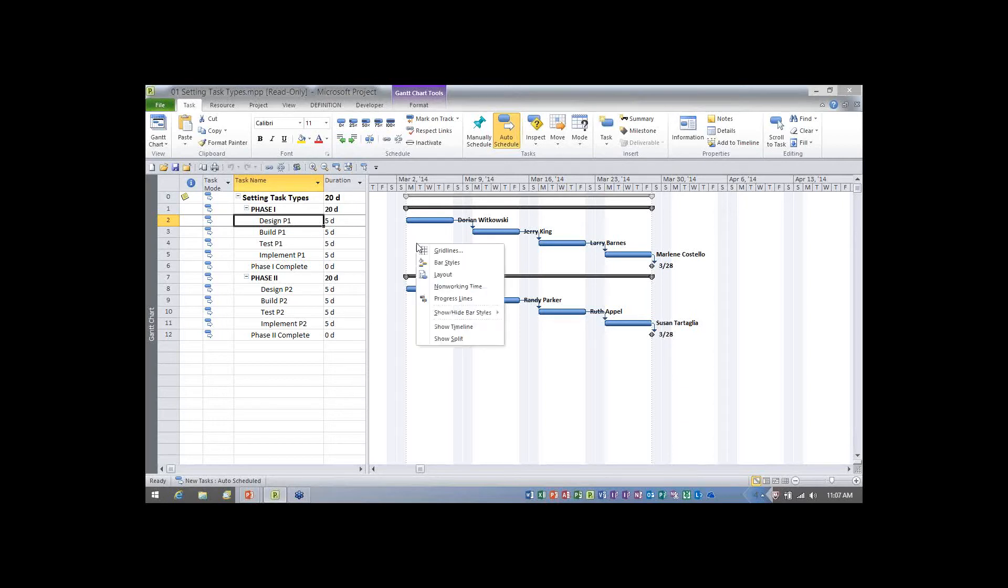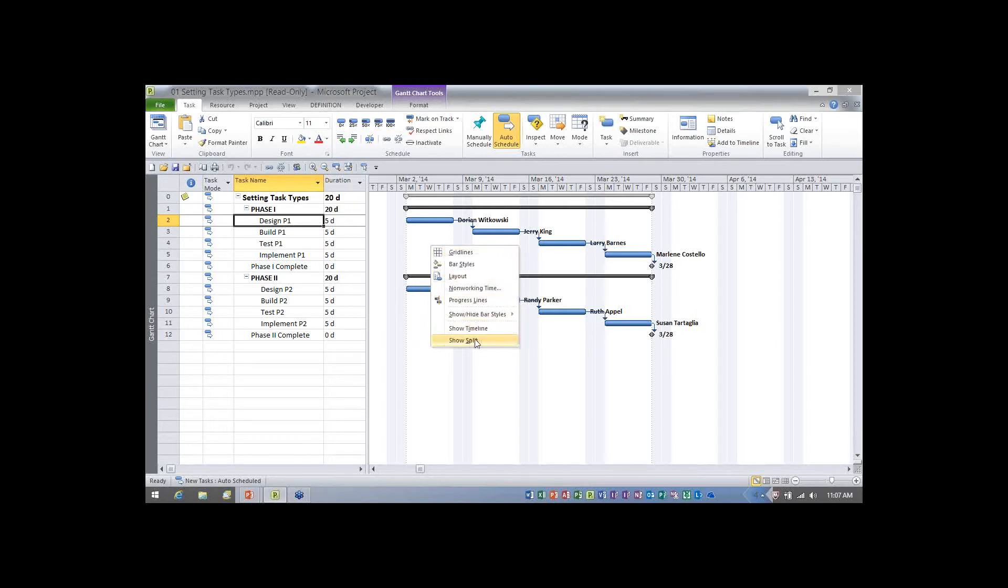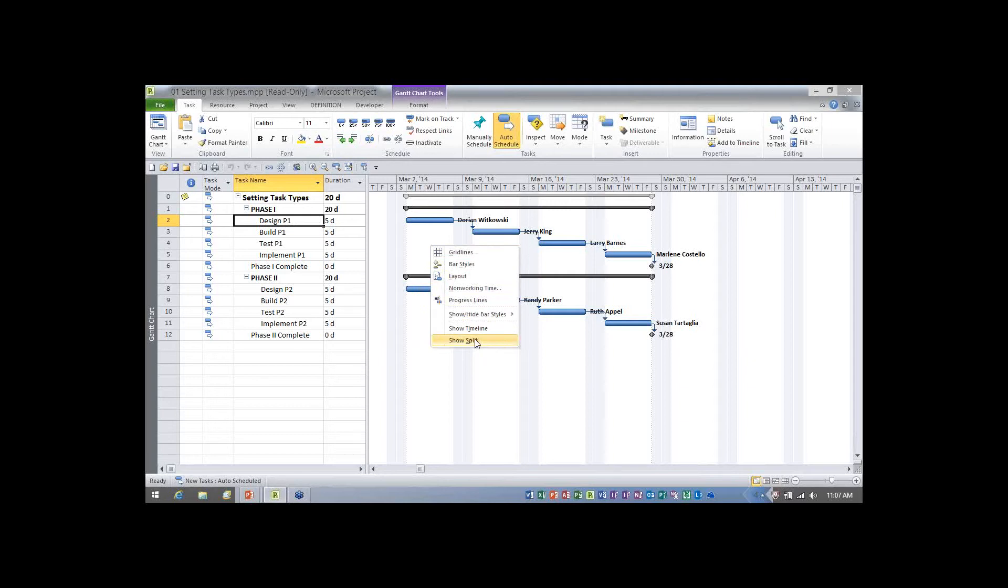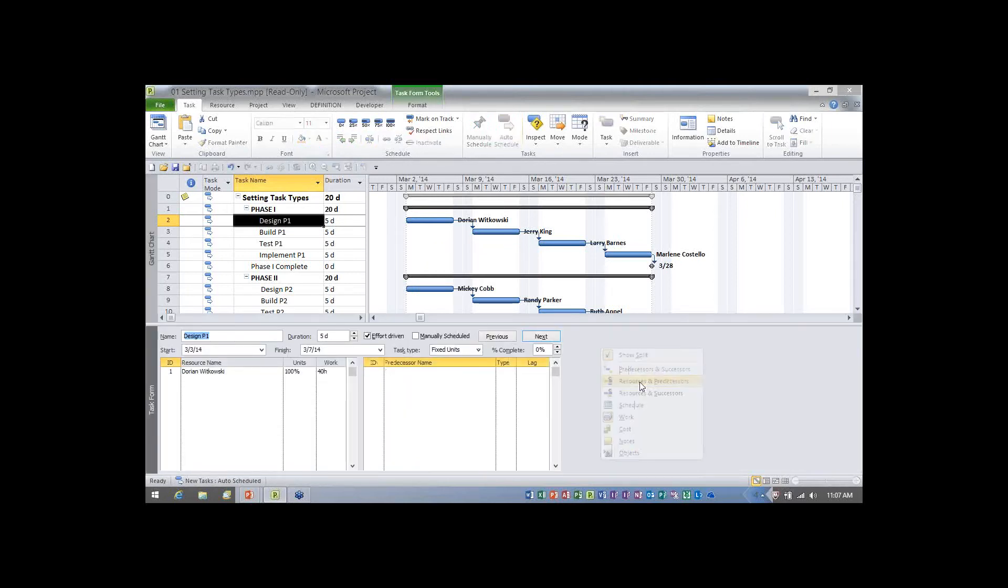So let's work with task types. The first method I mentioned is to display the task entry view or split screen view. Now the easiest way to do it is you can just right mouse click anywhere in the Gantt chart pane and on the shortcut menu choose the item called show split. What Microsoft project will do is display the Gantt chart pane in the top and the task form pane in the bottom.